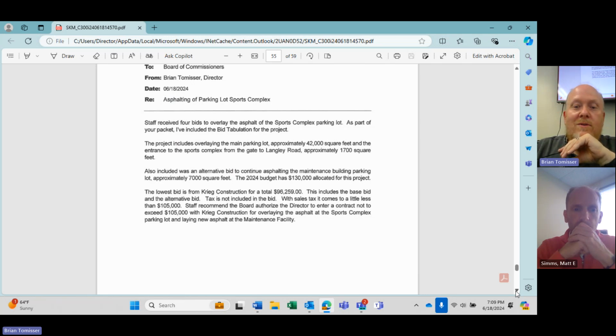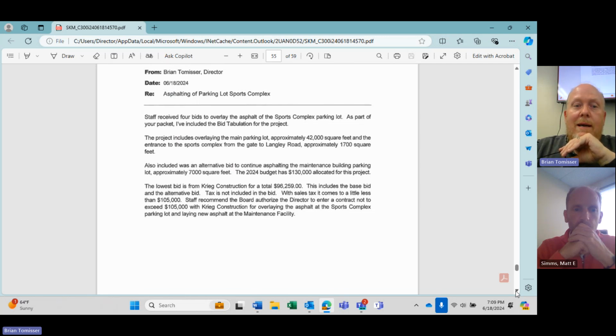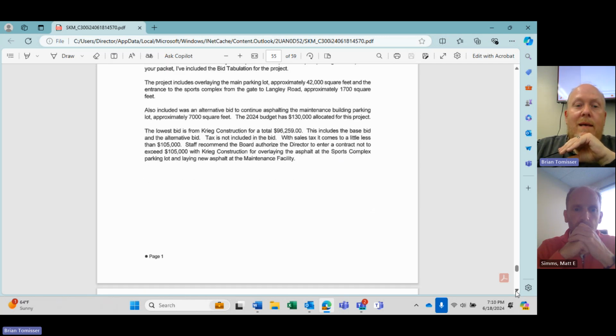So there was $130,000 allocated in the 2024 budget for this. Like I said, we received 4 bids. The lowest bid came from Craig Construction for a total of $96,259. There'll be some use tax and other taxes on top of that to come out to a little under $105,000. So that's a good size savings from what we anticipated.